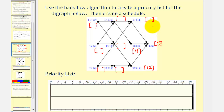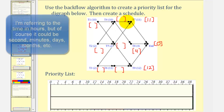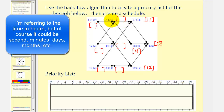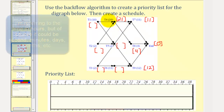Now working our way toward the left, if we consider task four, notice how there are two paths to consider — we want the path that has the largest critical time. If we come from this direction, the critical time would be eleven plus ten, or twenty-one hours. If we come from this direction, the critical time would be four plus ten, or fourteen hours. Since twenty-one is larger, we'll use the value of twenty-one for the critical time from task four.